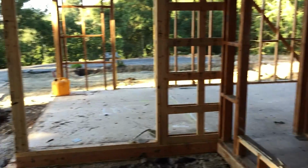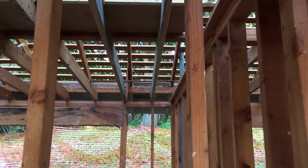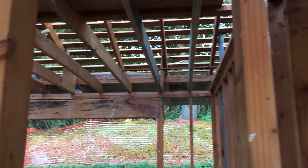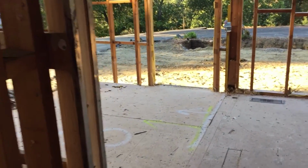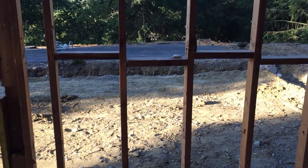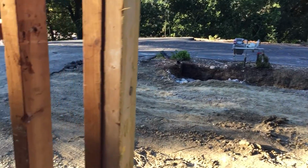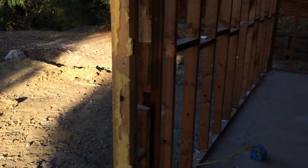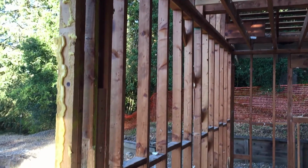We've got our change orders into the structural engineer to account for the new framing we'll have to do in this area. He had a good conversation with the framer in terms of what they think they need to do, and we've prepped the county that they'll have some changes to look at pretty soon. So hopefully that stuff all goes relatively smoothly. Now that we actually have the permit, the change order process should hopefully be a little bit easier, because they're just looking at a couple incremental changes specific to areas of the house versus the entire set of plans.